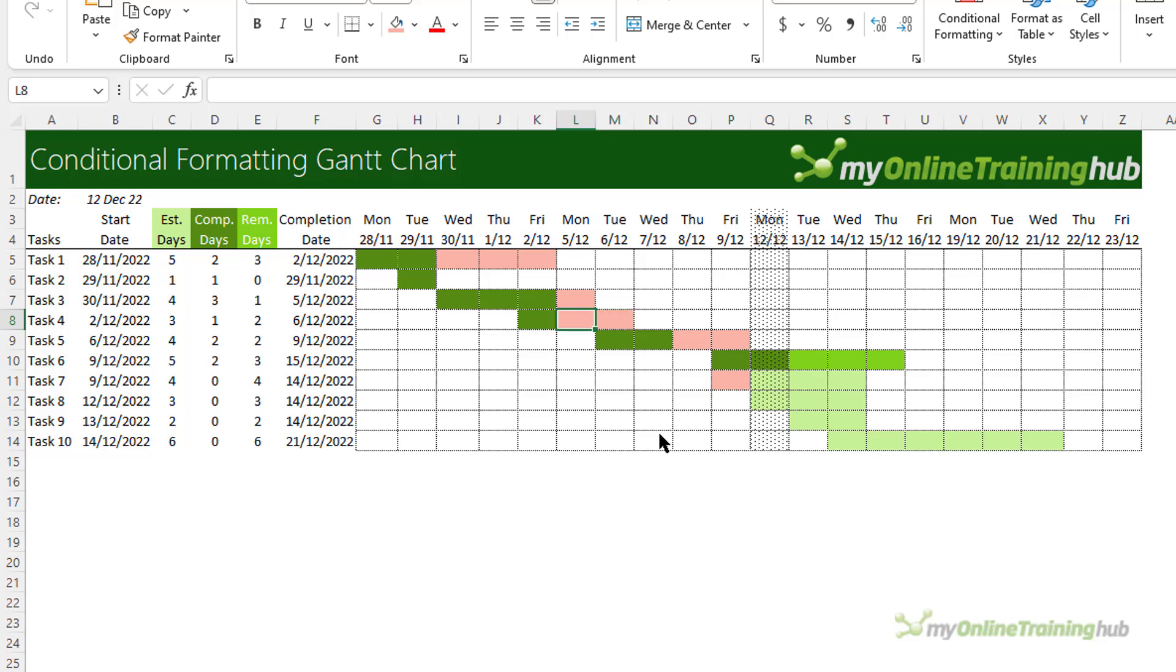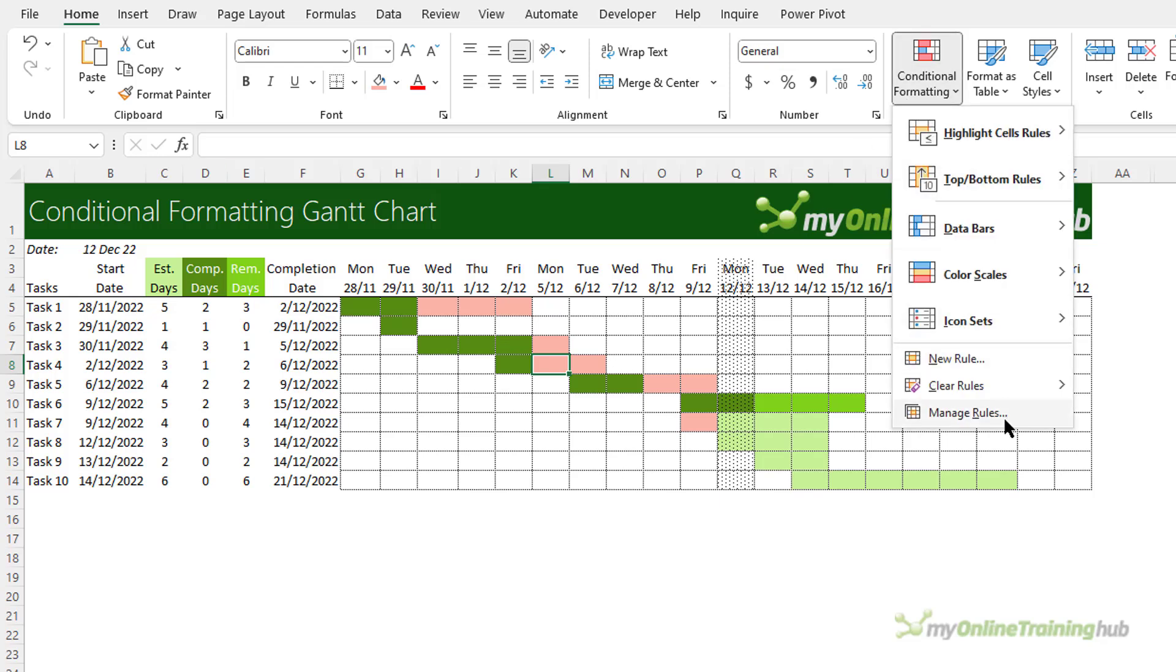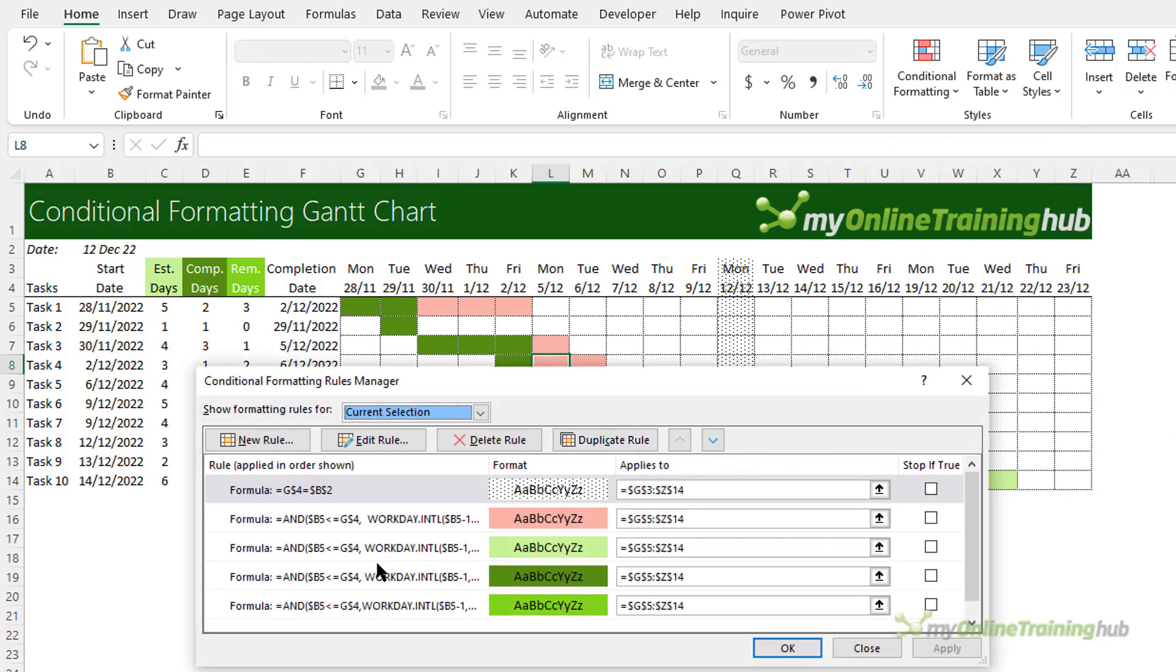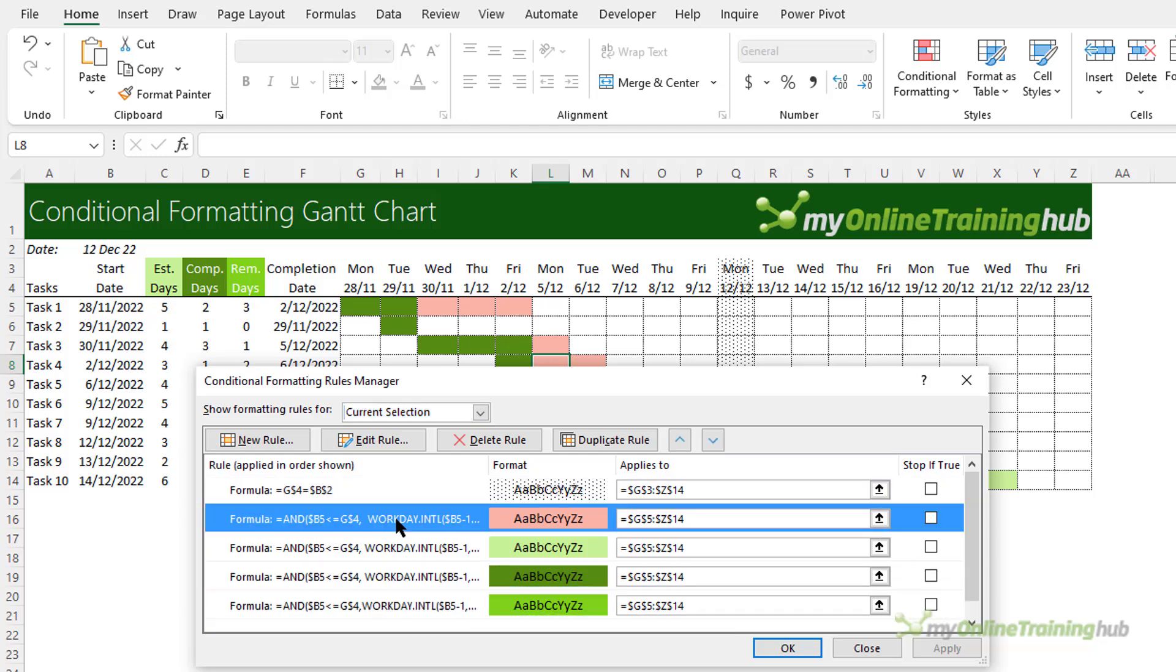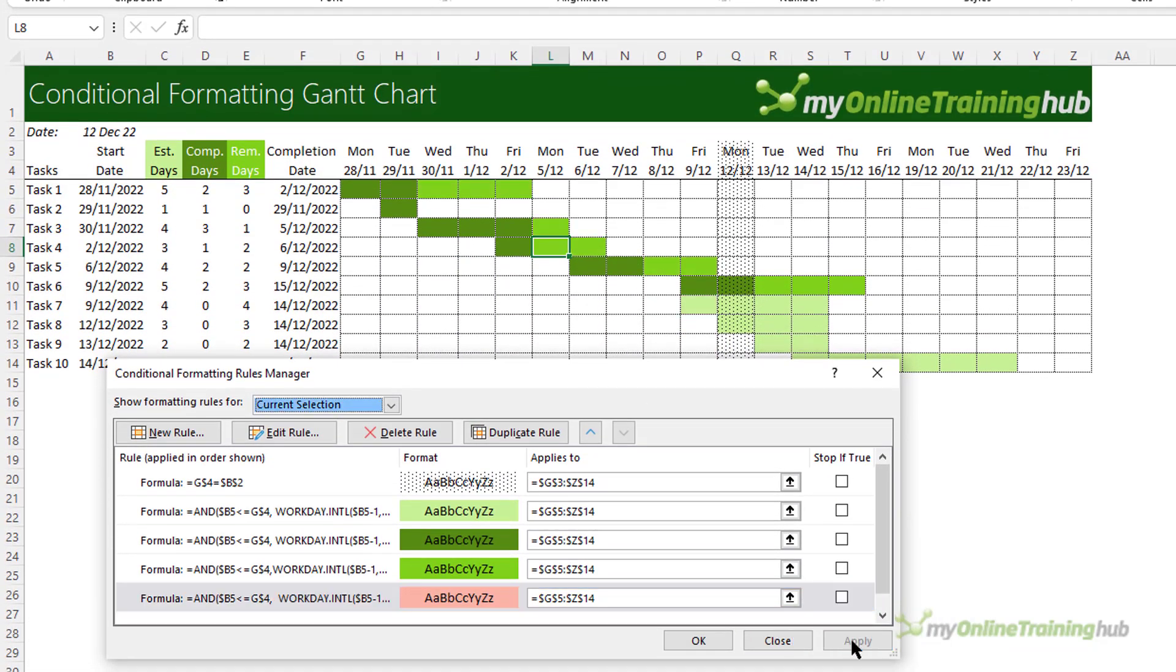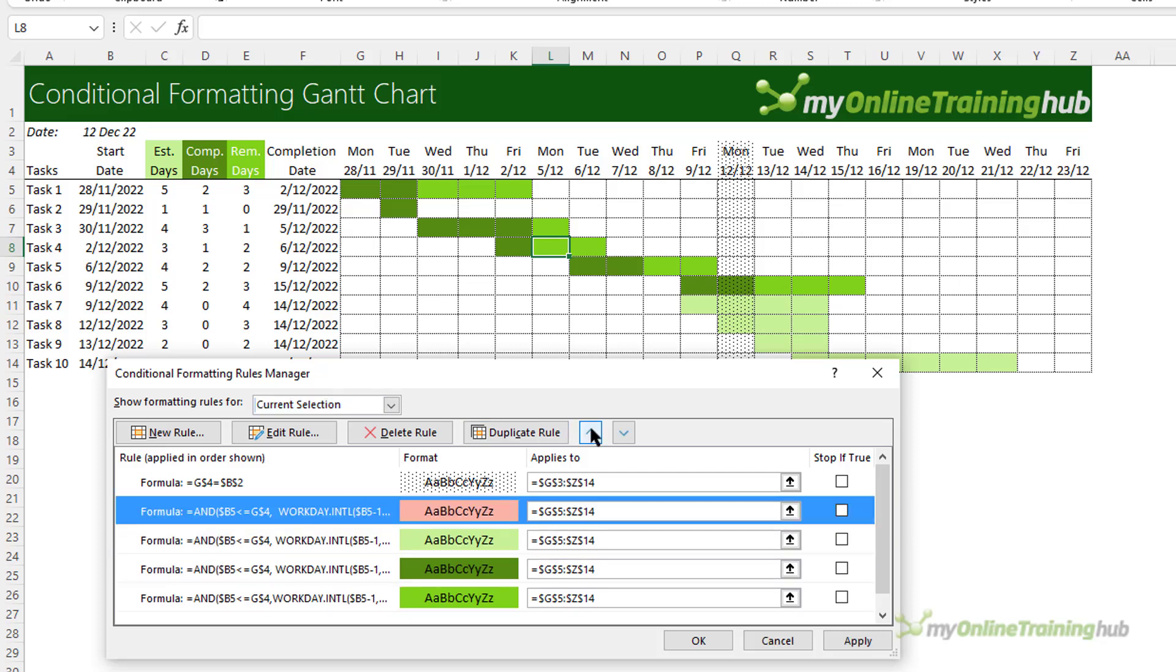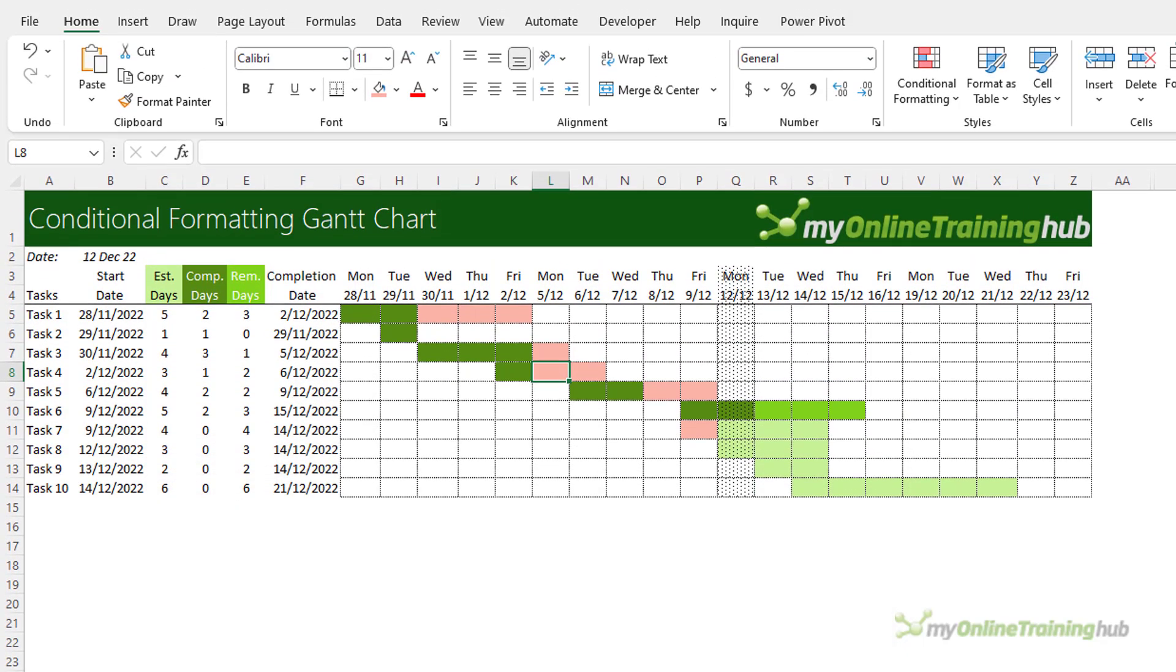Now, if you have trouble with the conditional formats not displaying correctly, one reason may be their order. You can modify it via the Conditional Formatting Manage Rules dialog box. And you can see the order they're in here. And as I set them up, the first format I set up is at the bottom and so on. So if I rearrange these, for example, put this one at the bottom and then click Apply, you can see this rule is being overridden by the rules above it. So it needs to be up here towards the top so that it shines through. Another reason you might have problems with conditional formats is if you don't get your absolute referencing correct. And I've created a video that shows you behind the scenes of conditional formats and how they're evaluated. I'll put a link to that in the video description so you can troubleshoot your conditional formatting formulas.